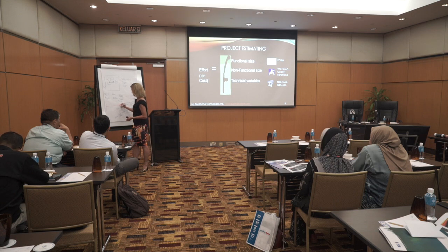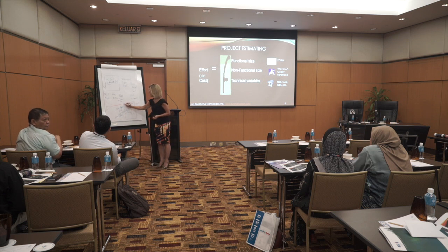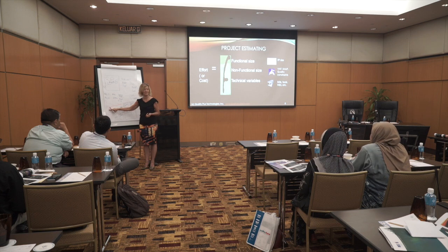This is time. Goes like that. The cone of uncertainty says in the very beginning of a project, where you don't know anything at all, you know very little, you've got dotted lines everywhere. It says you could be more than 400% inaccurate because you don't know anything.